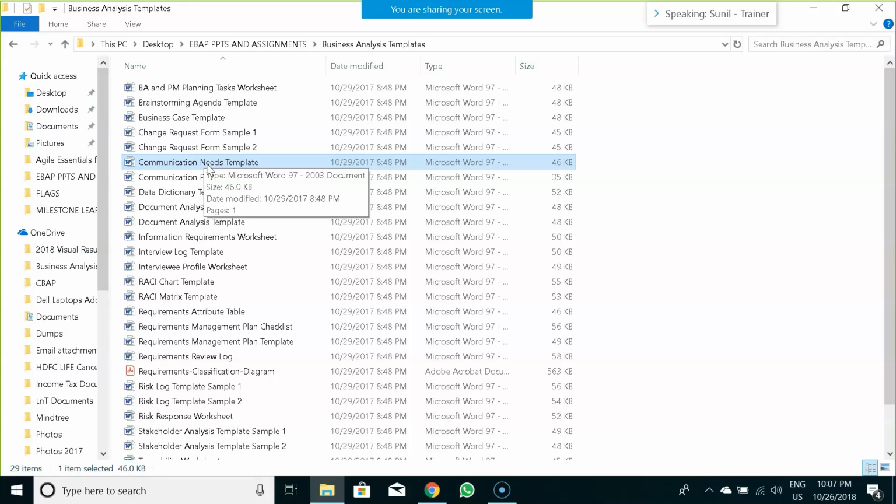So basically, anything new that is coming in during the development phase will go into the product backlog and it will be scheduled as per the normal sprint, but it won't be a part of a change request. Okay. So basically, change management would also not exist in the development phase, right? Anything related to change won't be there in the development phase. Change management would be there, but the term would be different. It would be called versioning during the development phase.